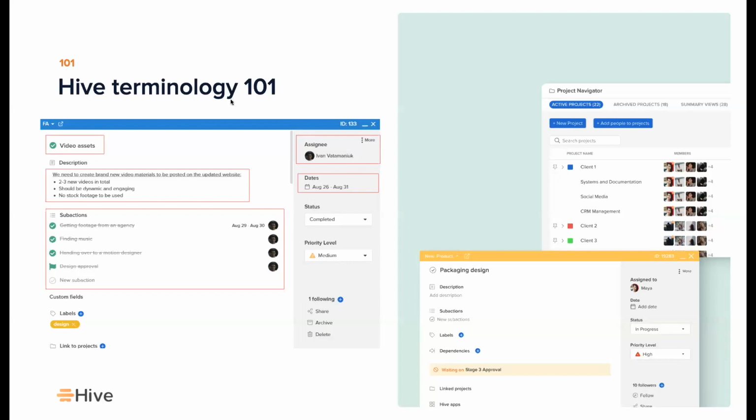But the importance of these two things is that when you go in to add a sub action, you can essentially break down the task further. So if I wanted to assign a sub action to myself or to Kate or to our boss Suze, we could assign these sub actions separate from the main action, so that Suze or myself would be responsible for the sub actions laddering up into the parent action that Yvonne is tackling. And you can see here that we've assigned one of the sub actions a different date from the parent action. This is just another way to make sure that all of the actions are clearly explained and the team clearly understands what needs to happen before the parent action can be completed.